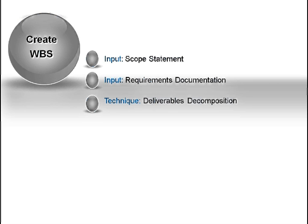The technique used to create the WBS is deliverables decomposition. Imagine you are given a project to create a fully functional international airport. For the sake of this example, let's ignore that creating an airport is bigger than a project and would probably exist at a program level or higher. You couldn't possibly sit down and jot down all the tasks necessary to complete this effort. The WBS won't contain any verbs — we're doing a decomposition of deliverables so we only need nouns.